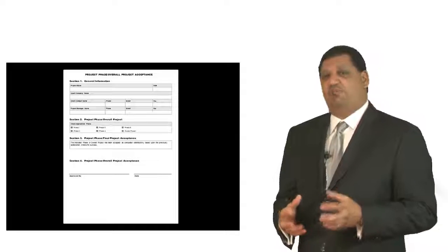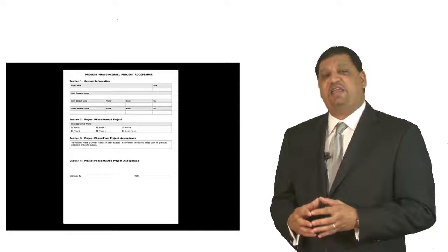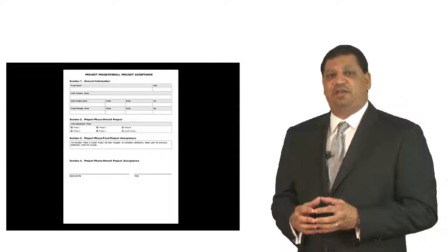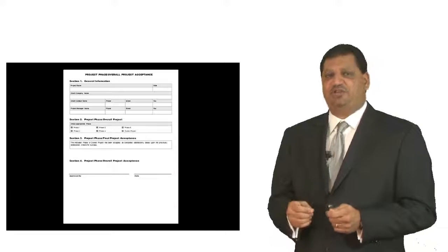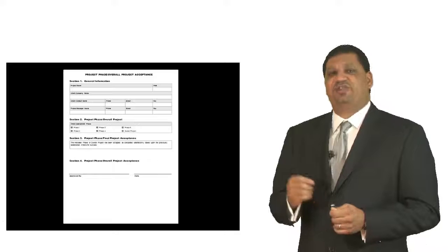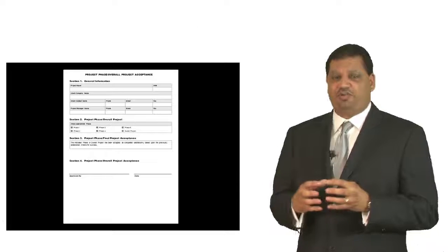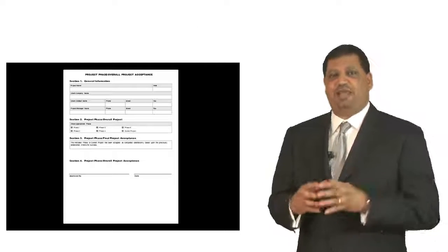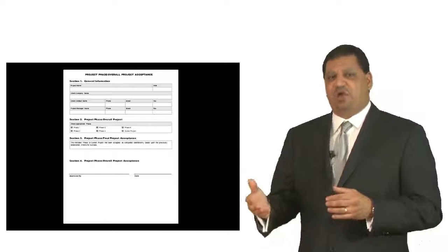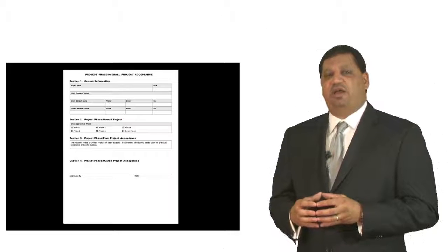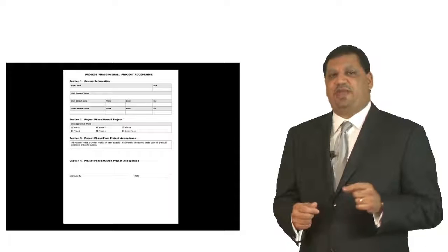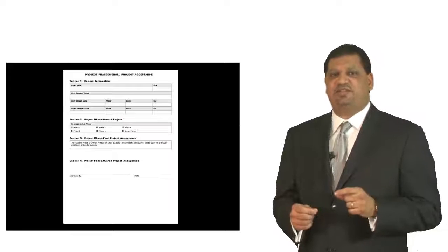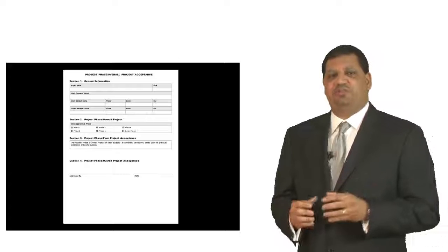During phase review, the project manager will use a phase acceptance document, typically to document the client's satisfaction that that phase of the project has met their satisfaction level based upon the success criteria that was agreed to during project plan acceptance. And then at the end of the project, final project review will include a similar document to confirm the client's satisfaction that each phase of the project was met by the success criteria that everyone agreed to during the project kickoff meeting.